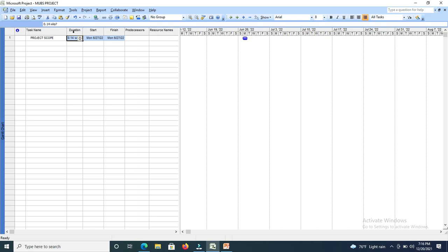Anything without a duration shall be given a duration of 0. You don't have to change anything under start or finish because the system does everything for you. Then predecessors, we shall fill later on after entering all the tasks.